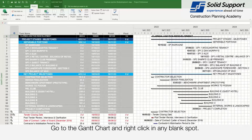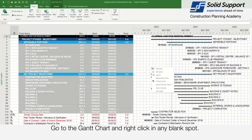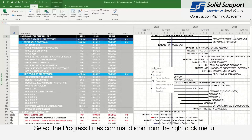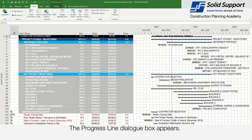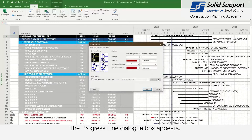Go to the Gantt chart and right-click in any blank spot. Select the progress lines command icon from the right-click menu. The progress line dialog box appears.